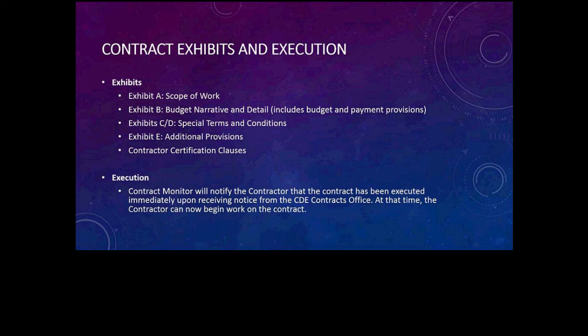So when can work begin with the contract? The contract monitor, which is the CDE programs consultant for the contract, will notify the contractor, the County Office of Education contact, that the contract has been executed upon receiving notice from the CDE contracts office.